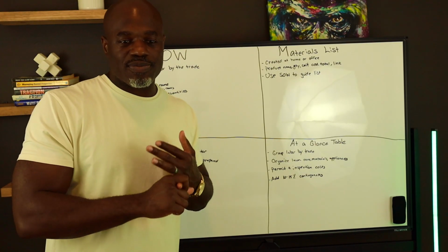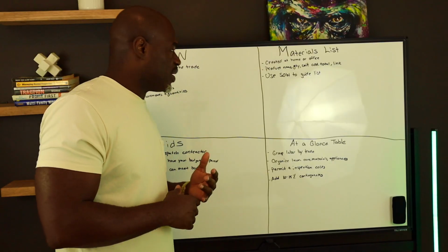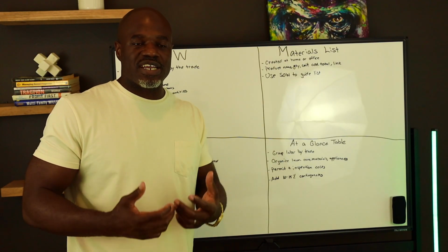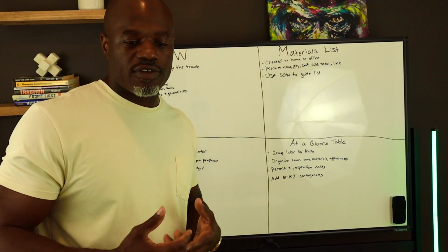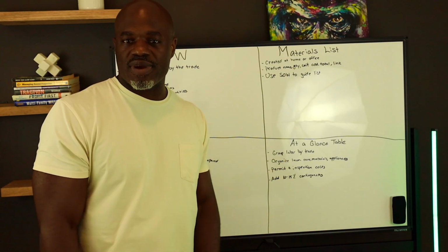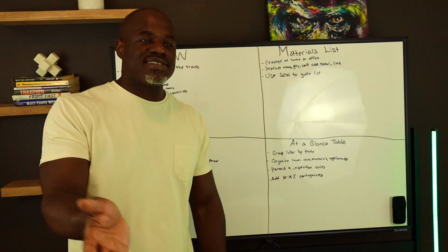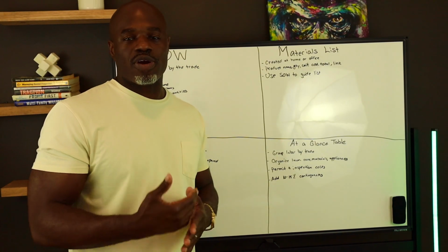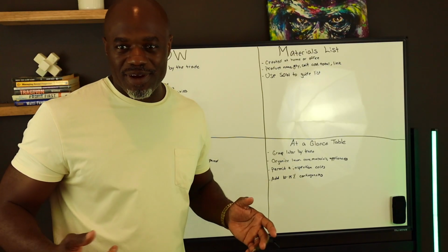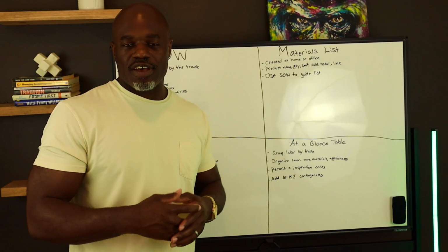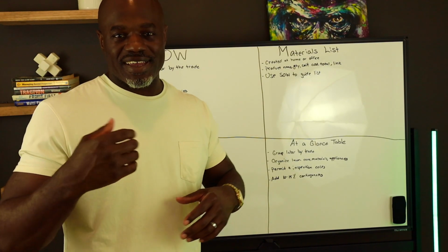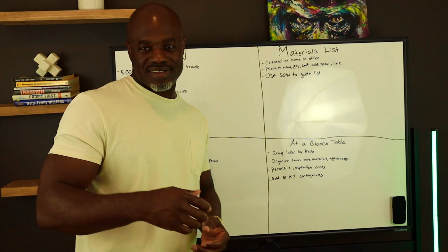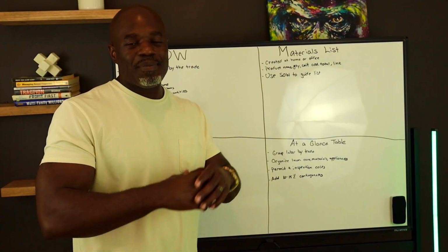You all will actually be surprised, but I've run into several people who just went into a business relationship with the contractor based off of just verbal direction. Yeah, I want to get this done, I want to get this done, but no real actual scope of work, no type of paperwork anywhere to be found. That lends itself to misinterpretations and hearsay. And then you get to the end of the project: this isn't really what I wanted. The contractor says, this is exactly what you said, but nothing was written down.